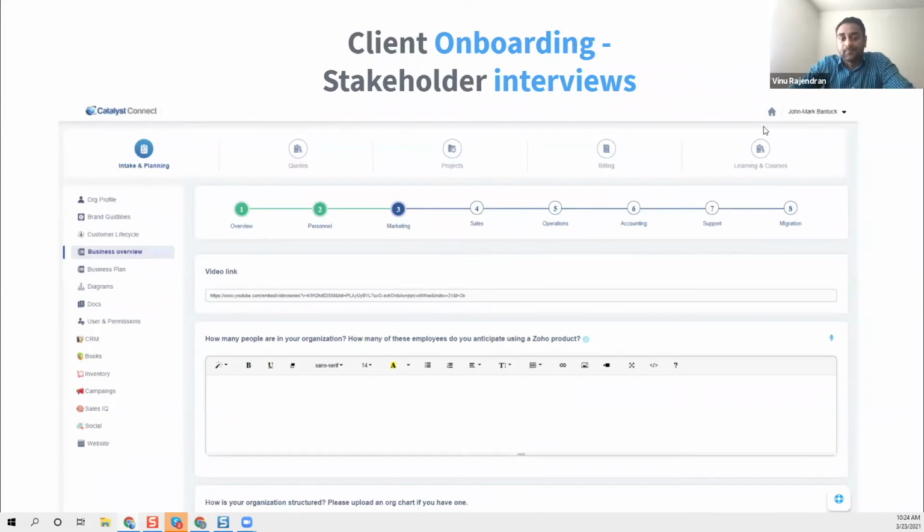Yeah. John Mark, to answer your question, we take the whole stakeholder onboarding and interview process pretty much the same as we do development. Everything is agile. Everything is sprints. There's a one-hour meeting, and after that meeting there are deliverables from them and deliverables from us. Another meeting is set. It might be with different stakeholders, but it's just a series of sprints. Each sprint is completed when the next meeting starts, and that's the start of a new sprint. We treat onboarding the same as development. Once we get through that, then you're in development mode.